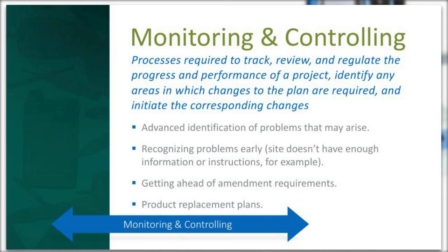And then finally, what is your product replacement plan? If you have a min-max thermometer at a site, that's a different replacement plan than potentially a calibration of a scale that's on a site. If your study duration is 2 years and your min-max thermometer is only good for 12 months, then very likely that's going to be replaced. But ensuring you have a plan to replace it in advance allows for the fact that you don't have any gap in actually having monitored that refrigeration or that medication.